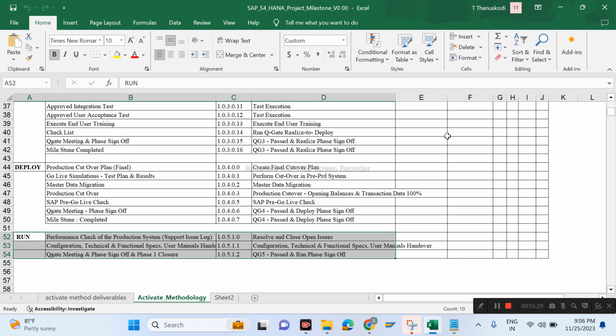The whole team will be there, and they are going to execute the business processes successfully. From day one, let's say from Jan 1st 2024 they are going to go live, and they are going to punch all the transactions in your SAP S4 HANA, right? Here we will get some issues. Whatever RICEFW objects we have developed, maybe you have designed the purchase order printout or sales order printout or check printing printout, they will say, okay, that is not printing correctly, please check it. As functional and technical consultants, we have to rectify those issues, and we address them as ticket support issues.